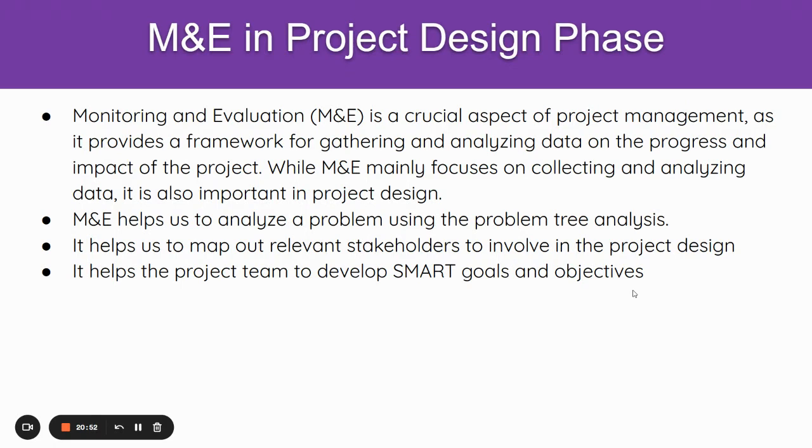Now the rate of illiteracy in computer has actually reduced to some significant number. We can tell, and we can easily tell. Maybe in that particular community, doing our assessment, we realized that out of the 500 young people in that age range, only 50 were computer literate. So we were able to know that 450 of them were actually not computer literate. And then our program is going to run for 3 years, and we are going to ensure that at least 300 people are trained and they have that skill to operate and use a computer.